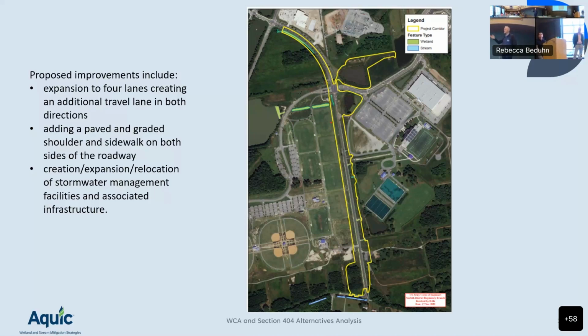So what is the traffic count that is bringing you to this conclusion that you need that extra lane? Is that trail connecting something else on a network? Or is this just kind of a trail going out to nothing? What are those side slope requirements that you need for both that road and that trail? Things such as on the water side, yeah, I want to see the rationale. Why you landed on that basin right there.